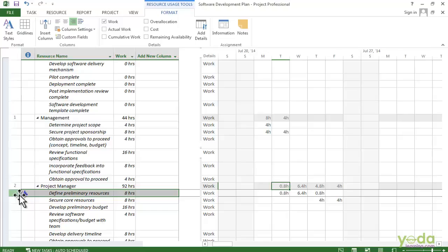Now you can't create custom contours, but you actually can edit the hours in this grid. So here, for example, I could type in 1 hour on the first day itself. So here let's make changes to 1 hour and 2 hours on the second day in this grid.